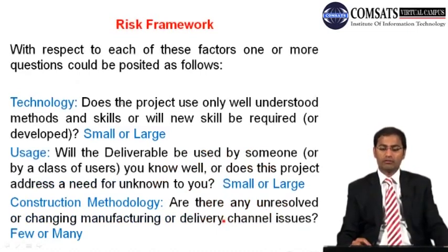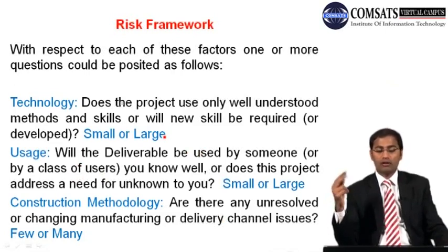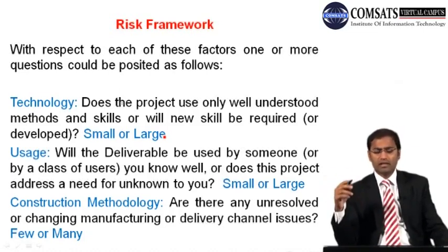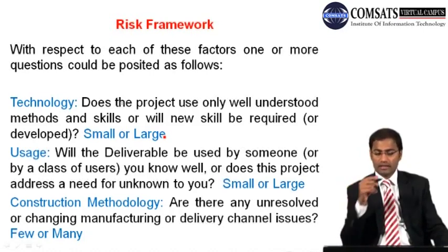So with respect to each of these factors, one or more questions could be posited as follows. Technology: does the project use only well understood methods and skills, or will new skills be required or developed, small or large? As far as usage is concerned, will the deliverable be used by someone or by a class of user you know well, or does this project address a need unknown to you? So small or large scale, you can choose one.